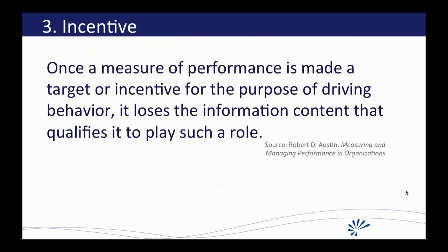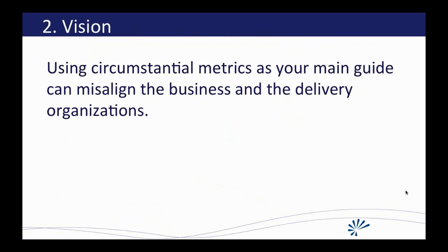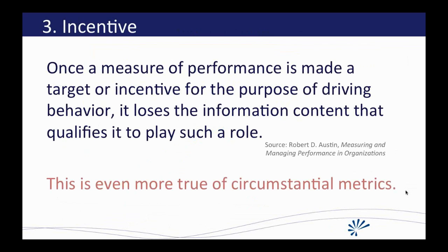So that's an extreme example, but this is the type of thing. As soon as you put incentives around something, you can no longer trust it. And I've seen it as simple as a well-meaning Scrum Master saying, hey, if you meet your goal this sprint, we'll take you to lunch. You know, the team can afford their own lunch, but that pat on the back was enough incentive for them to really start pushing back if anything weird happened in their sprint.